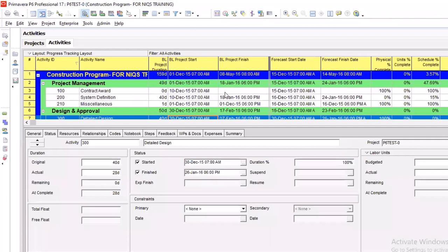Although my project is not finished yet, this is what is showing me. At the end of the day, this project is already in how many days of delay? 14 minus 8 is about 6 days, right? So you have like a 6-day delay already. So that's how you do your analysis. You are comparing this and this, comparing this and this. That's what shows you your forecast.